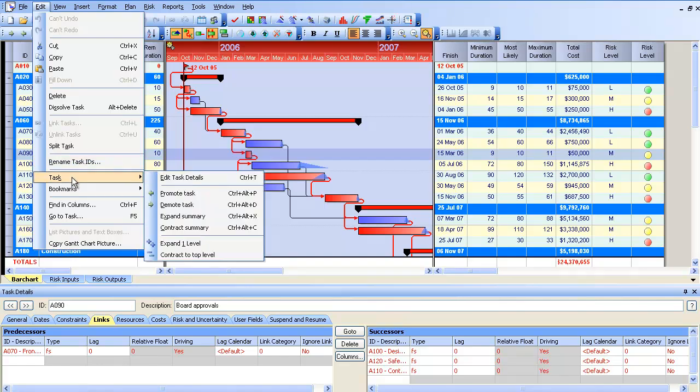Now, some of these menu items have an additional, it's collapsed, so you can go and see some more options. So you have some for tasks. Primavera Risk is different from Primavera Risk and more like Microsoft Project in the fact that the work breakdown structure, or the WBS, isn't held separately like a filing structure. It's actually more of a promote and demote function in the project. So if you've got 2 activities and you demote the second activity, the first activity or the activity above will become a summary task or a WBS element.